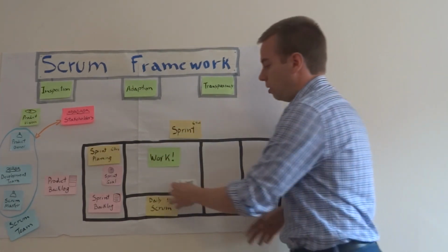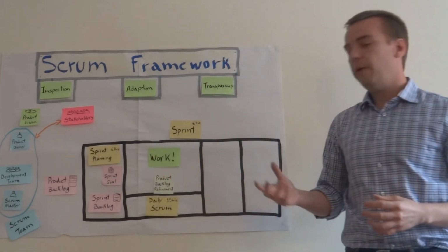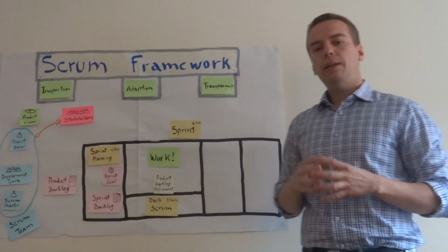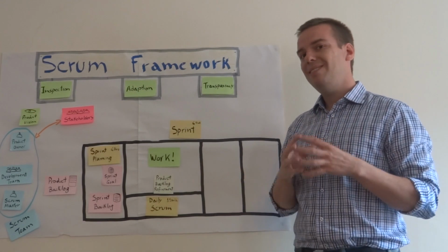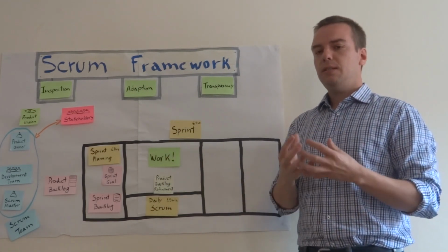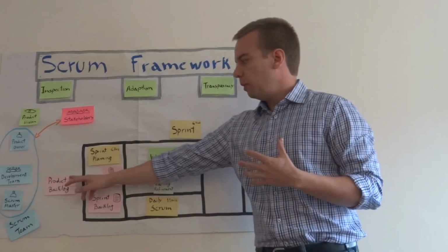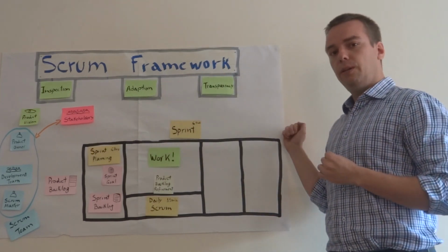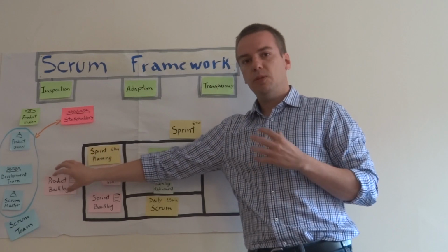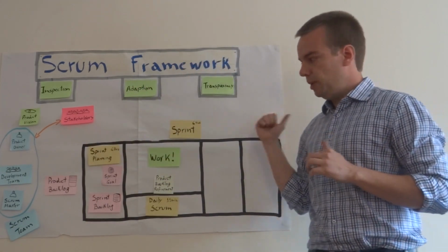Throughout the sprint, we also have an implied event called Product Backlog Refinement, where the product owner and the dev team get together and they don't spend more than 10% of the whole sprint time to understand the most valuable items on the product backlog for further sprints. Not within the sprint. They are trying to understand the most valuable items that they're gonna work on in the next sprint.